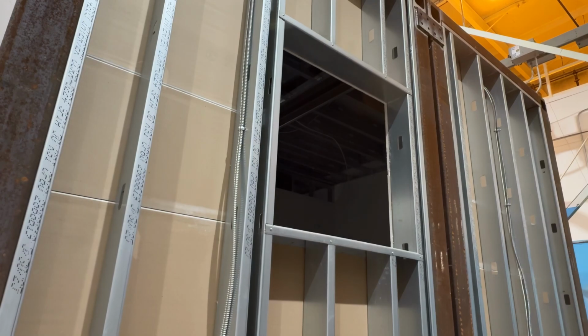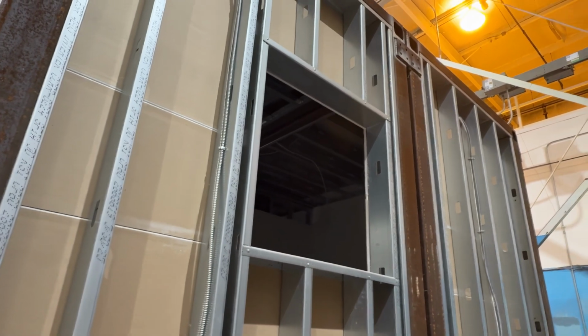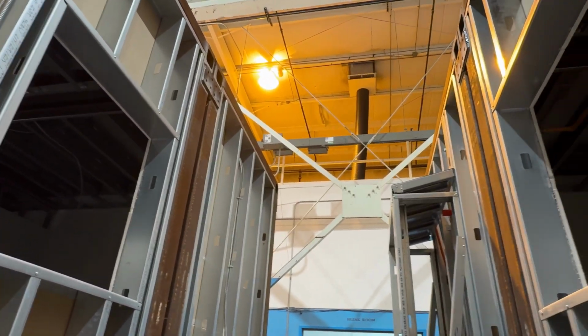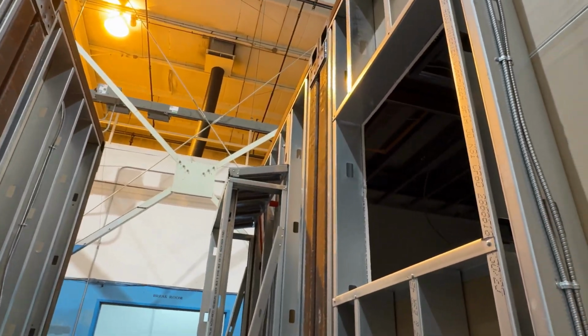At a job site, it may take 10 guys to do what 3 guys on our factory floor could do. So each day there's a task to install this. Now, keep in mind, we have all the materials ready to go, so there's no lagging materials back and forth. They're staged right next to their working area. So it's easy for them to get that material into where they need it to go and be able to complete the task and scope for that day.